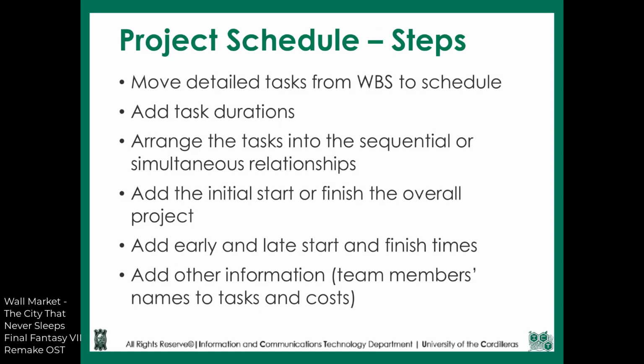The following are the steps for the project schedule. First is to move the detailed tasks from the WBS to the schedule. If there are no detailed tasks, then the project activities would do. Afterwards, the task durations are added. These are based from previous experience as planned by the stakeholders, customer, company head, and some initial team members.